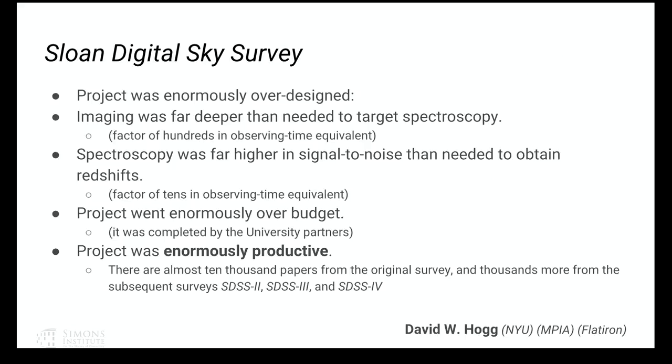However, the large-scale structure papers weren't the most important papers. The project produced something like just under 10,000 papers — it'll probably pass 10,000 this year. It also led to subsequent surveys using the same hardware to do new science, also producing thousands of papers. It was extremely productive. And even though it went over budget by a factor of something like 14, it was more productive than anyone expected by more than that factor. So actually it was a win in the end.